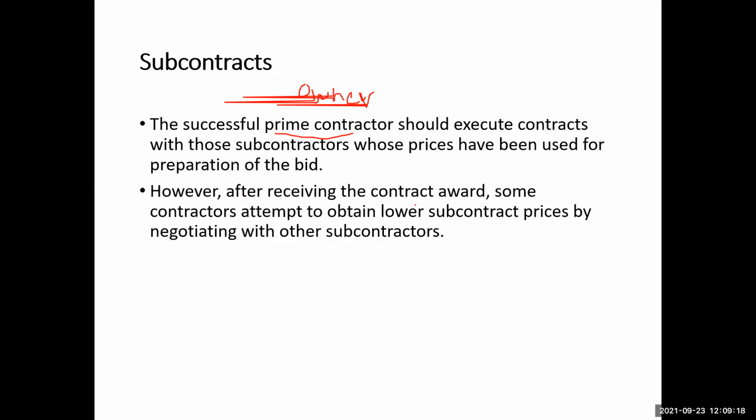However, after receiving the contract award, some contractors attempt to obtain lower subcontract prices by negotiating with other subcontractors. So the contractors will think that, okay, earlier the prices which I got from the subcontractors were too high.